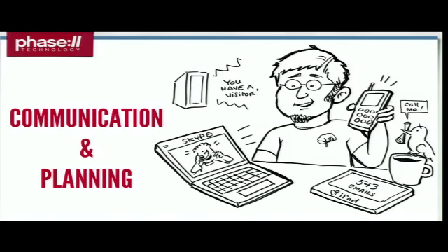Well, first and foremost, you rely on tools. Establish up front what are the ground rules around IRC, chat, instant messaging. Do you want project stakeholders instant messaging the developers? Or is it crucial to your project that developers remain totally independent from those people in terms of real-time communications for distraction purposes? We've seen it. We run it both ways. There's pros and cons to both. The key is that you establish that jointly amongst everyone up front in the project before it just becomes something someone starts doing halfway down the road and someone else isn't.